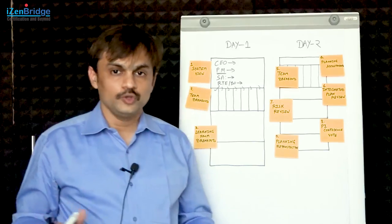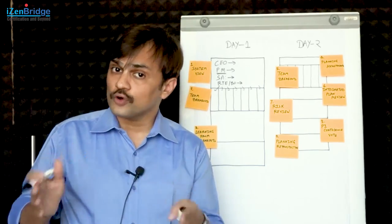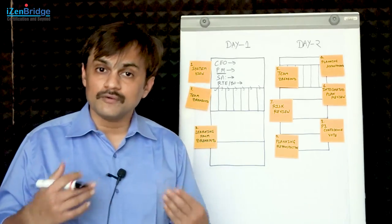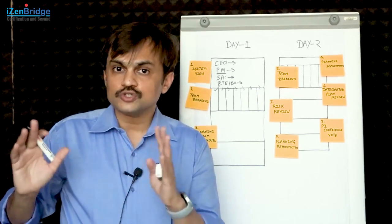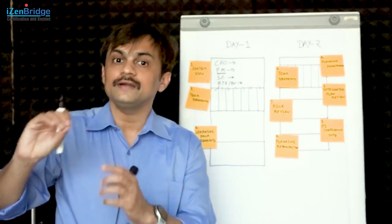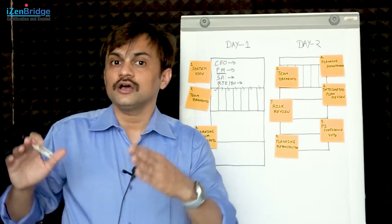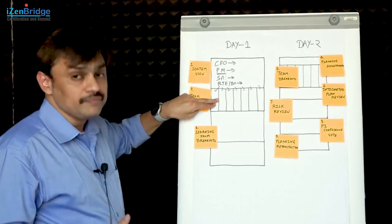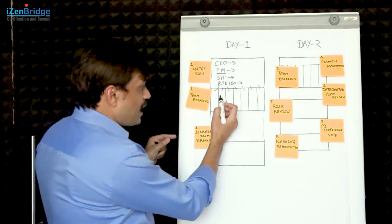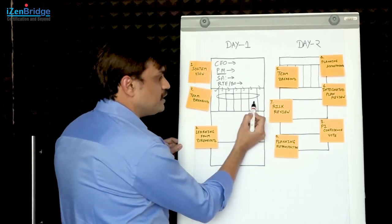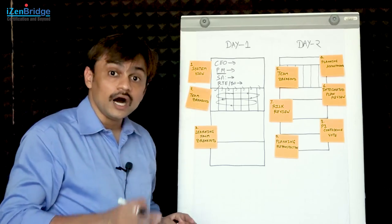As a team, we should be able to figure out that by doing these 4 iterations of development, which portion of the program backlog we will be able to finish, and how do we help management achieve what they want from this particular program increment duration. That is why we are doing this breakout session - we need to come up with our team's plan for the upcoming PI. This plan may have a lot of interdependencies, so while doing the breakout sessions, we end up doing various integrations of our plans by talking to different teams and understanding how they are taking a particular dependency.